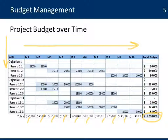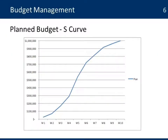That baseline is the information you're going to be using. With this data, you then create a chart. This is known as the S-curve chart because it has the shape of an S. That means that from the beginning, there are not that many expenditures. As you start making progress, the expenditures will go higher and higher. Then as you're finishing the project, you finish all those planned expenses. This is the plan, and you're going to use that as a baseline and compare it to what's going to be happening in the project.